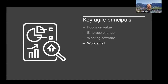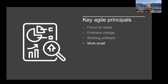Work small and limit work in progress so you can be very confident about what you can deliver. If you're a team of five people it's tempting to have each person working on different things, ending up with 10 or 15 things in progress. Instead, make it a week or two, and aim for roughly half the number of things as you have people — if you're five people, work on two things at a time. Make it small so you can make it certain, so you can deliver working software quickly and move on to the next thing.